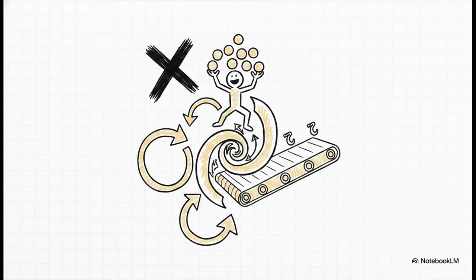Now, if you can't decide between the two, well, someone actually invented Scrumban. Yes, I know it sounds entirely like a made-up word, but it's incredibly practical. It takes the absolute best of both Agile worlds. It uses Scrum's structured, planning-focused sprints and marries them with Kanban's continuous pull system and work-in-progress limits, which restrict how many tasks your team can juggle at once. It's a perfect hybrid if your team wants continuous flow, but still needs designated times to plan and work.